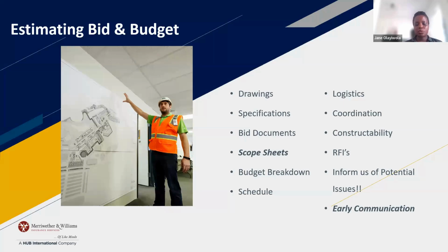Sometimes you will also be provided a BIM model, a computer aided design BIM model, for you to look through the different scopes of work and look at conflicts. Maybe the MEPs, the electrical, is conflicting against the structural steel. You might want to find that out in the BIM model before you build it on site. So that's where that's useful. That will save you money and time, right? And finger pointing on site.